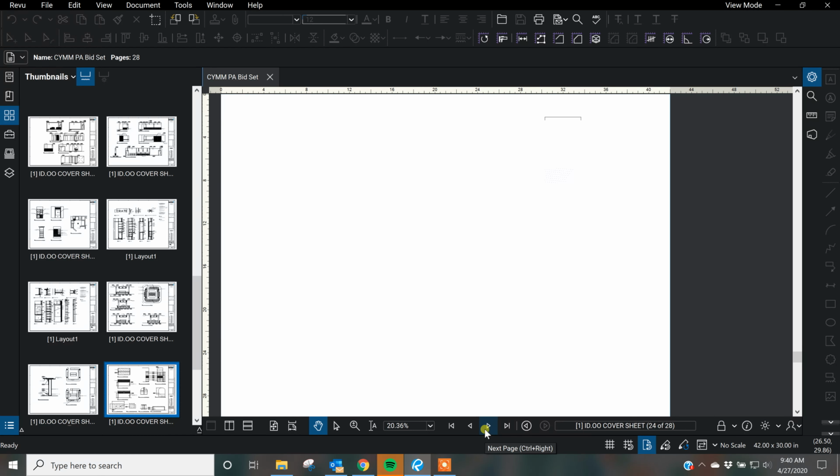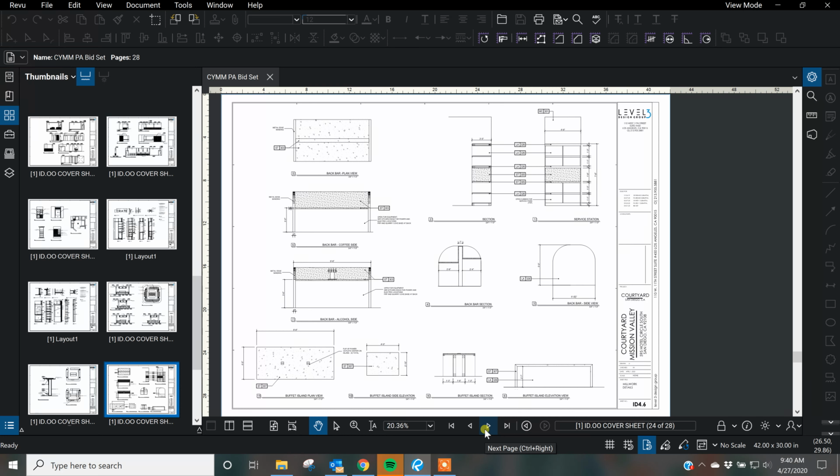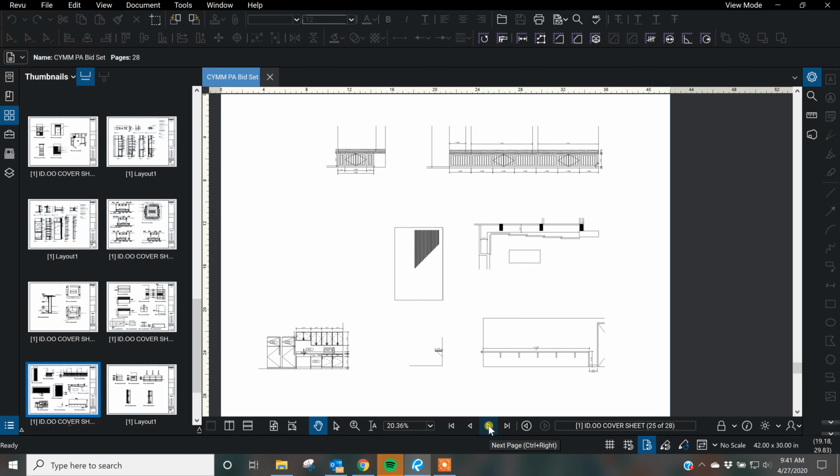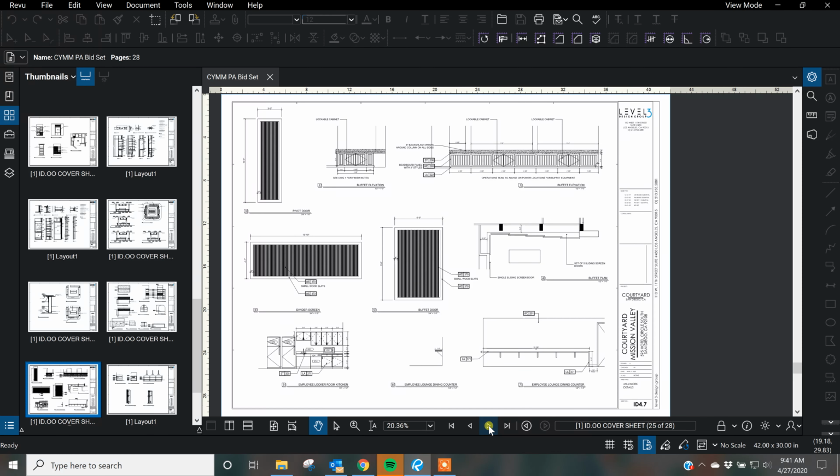So the construction documents get super detailed about how we want everything built, because this is how we get an accurate bid. The more accurate your construction documents are, the more accurate your bid is, the less likely you are to have add services and change orders later. So the goal is to bid everything correctly the first time. If this is lacking and they don't send any RFIs, which we'll talk about next week when we talk about construction administration, then a lot of RFIs can result in cost implications, and we want to have as few cost implications as possible. I mean, RFIs are a given, you're going to have them. Stay tuned next week to learn about RFIs.